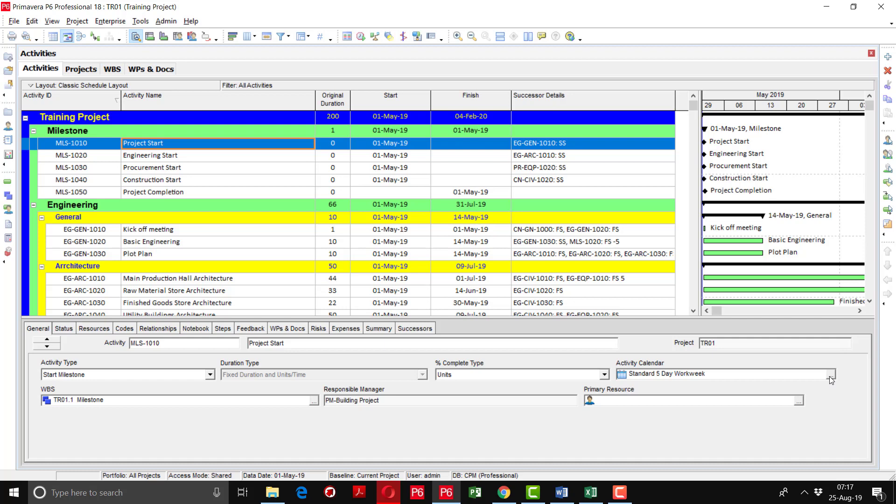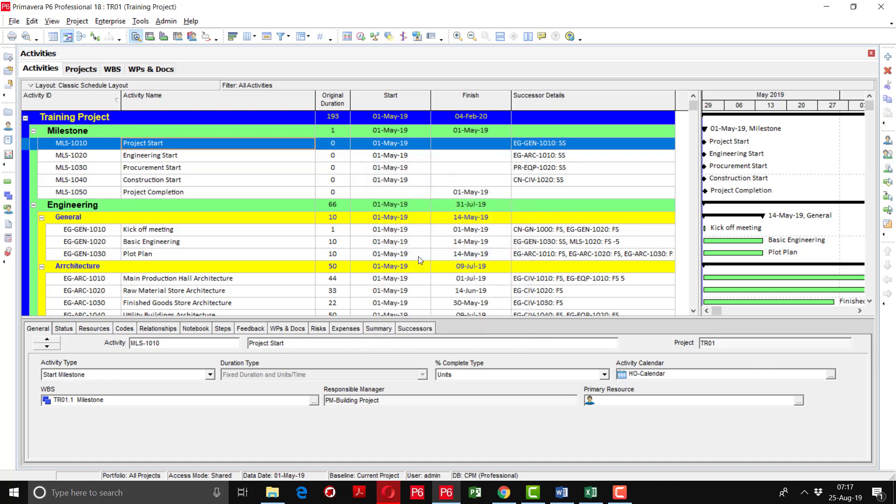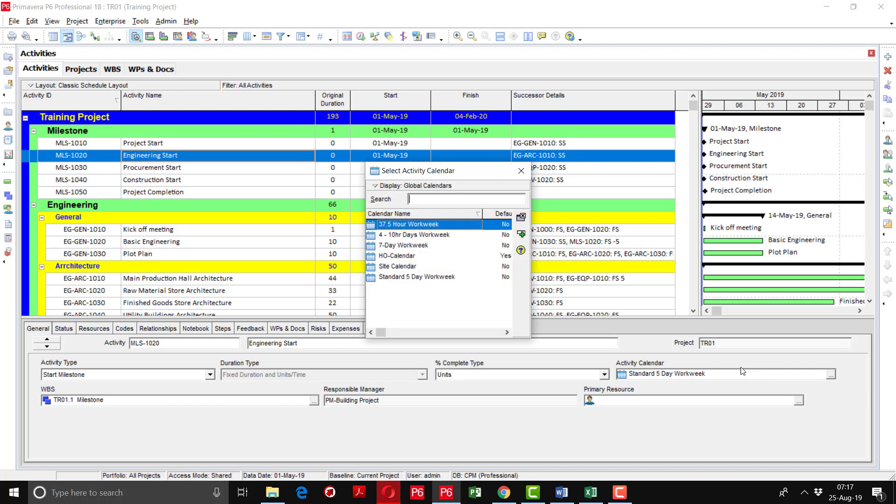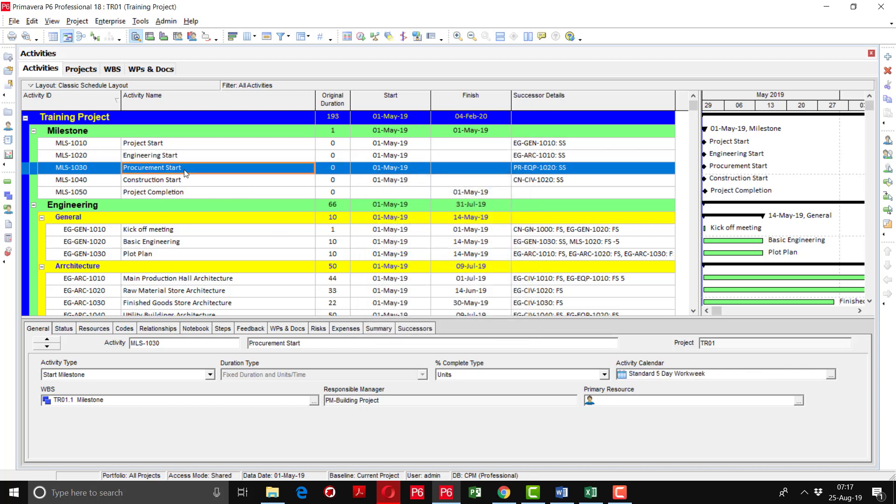You can just simply click this one and you will select the required calendar. I am going to select head office calendar here, but it will take a long time to do each and every activity. Then engineering start, you will say that it is the head office activity, you will assign the head office calendar.